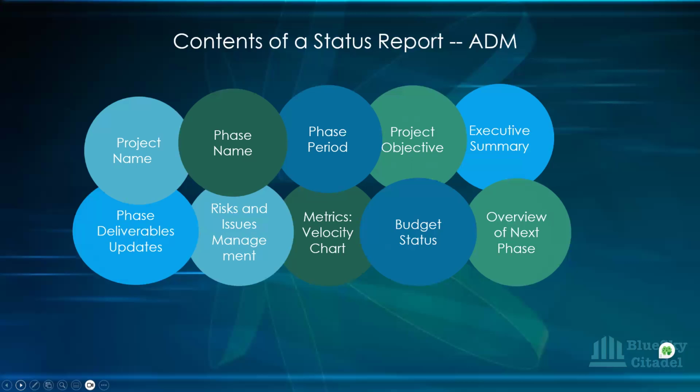For example, if the sprint or the phase focused on completing the authentication module and all that, you could say something like this: this period focused on completing the authentication module. 85% of planned tasks were completed. The main risk identified is a potential delay, what was the delay, and everything. You're able to explain that.